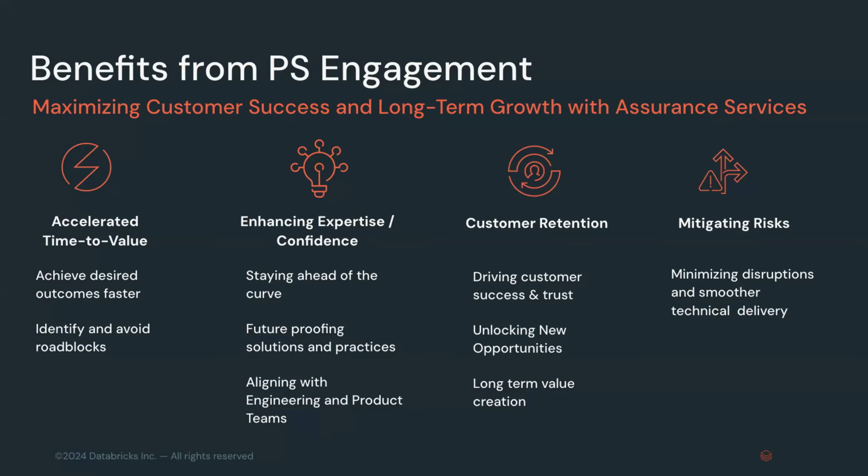Right. And okay, if we spend that much time on the preparation stage, which is absolutely justified and well spent, what is roughly the percentage of code conversion and validation, which are stages 4 and 5 of the migration journey that Elga showed before? So I think code conversion is probably only about 20% of the journey, right? There's tooling, and we'll show some. We have Lakebridge. It's the easy part now, especially with agentic systems. The rest of the time, 60-70%, is validation.